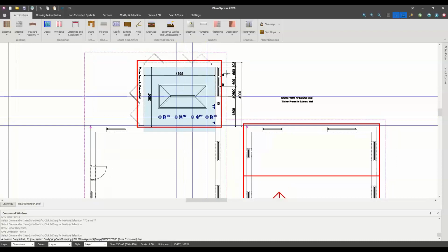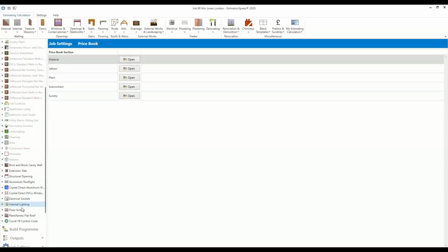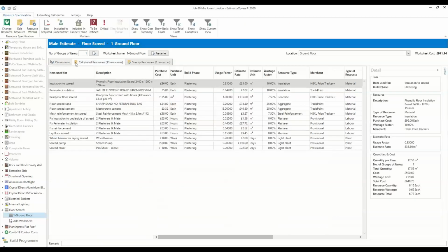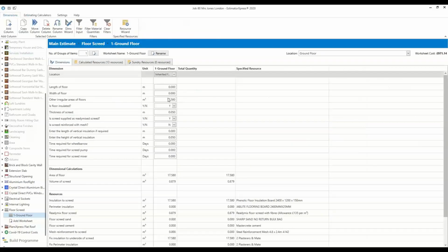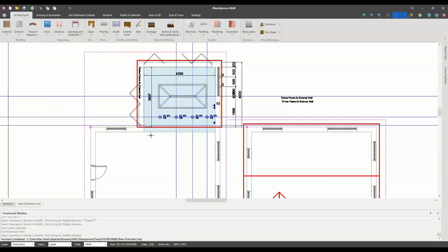And then what you're doing is just screeding the area that you want. If you only want to do a half screed, I could have just half screeded it if I wanted to, and then it will estimate that. Once it's pulled into the software under my estimate, the screed is now giving me an area. Under the dimensions, we've now got 17.5 square meters of screed on that floor. That's all determined by how I've placed it on top of the slab. Hopefully that answers that particular question.